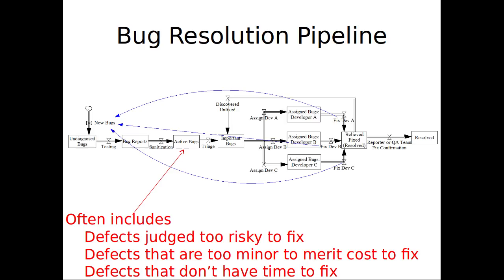So bugs, defects that are in the balance late in the stage when you're getting close to deployment are particularly worrisome, because if you try to fix it, you might not have time to have a second chance at it, and you might not even know that you've introduced a serious instability until it's on people's devices, on their desktops, it's out there on the web.